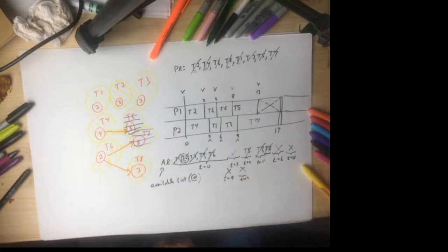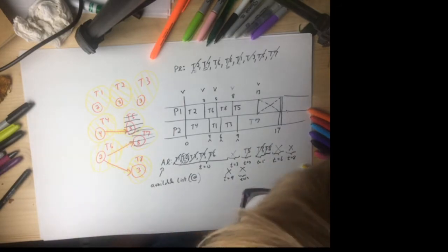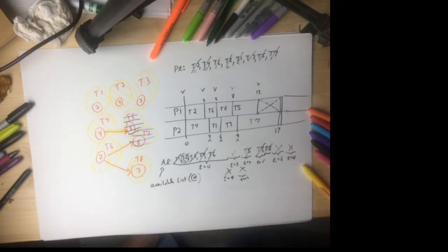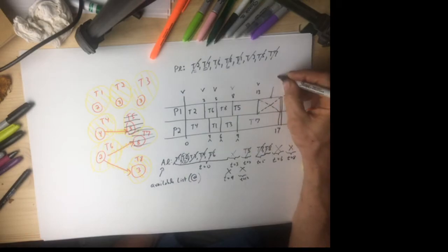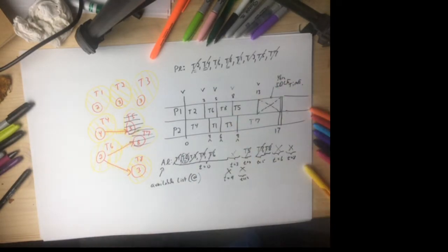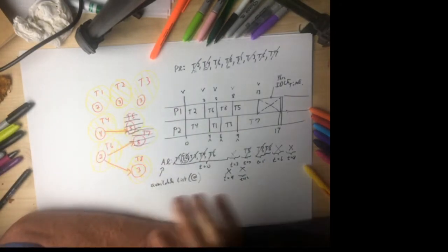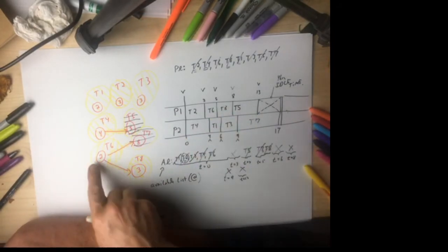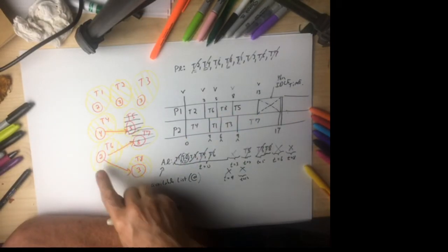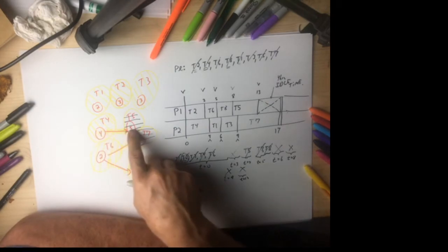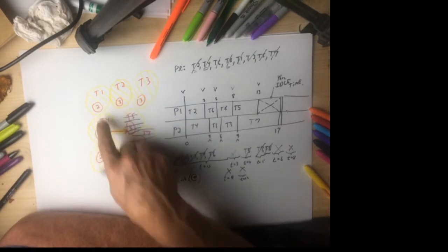Now, when we complete a schedule, we will ask, well, is that a good schedule? Well, first off, person 1 has 4 hours downtime or idle time. So I don't think any boss really likes idle time, does he? Second, if we had looked at this digraph before we started the problem, we would have seen there's a 5, here's a 10, here's a 9, 3, 3, and 2.